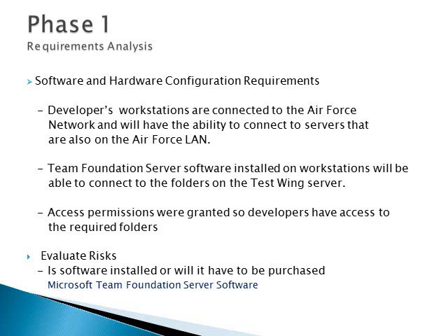The biggest risk associated with this project was the possibility of having to purchase the Microsoft Team Foundation server software. Government budgets are tight, and the client expressed concern about possibly having to purchase the software. I was able to determine the Team Foundation server software is included as part of Visual Studio 2010, which the client already has.